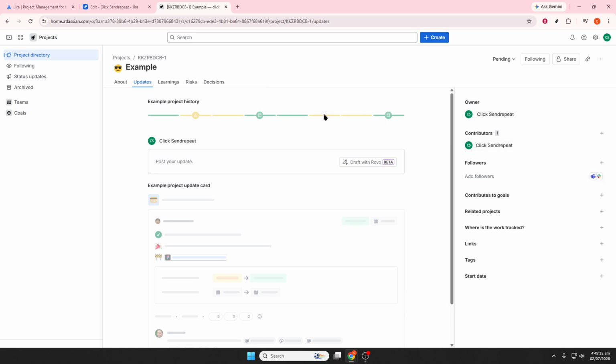From there, open your project board to organize the work. This is where you'll see issues moving through columns like To Do, In Progress, and Done. As work moves forward, drag issues into the appropriate column so the board always reflects the current status. You can also update issue details like due dates, priorities, and labels whenever needed to keep everything accurate and easy to sort.